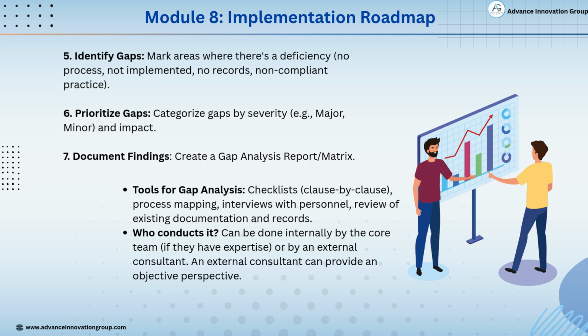This means creating a gap analysis report, or matrix, where everything is recorded clearly. For this gap analysis, we use various tools such as clause-by-clause checklists, process mapping, interviews with staff, and reviewing existing documents and records. As for who should conduct the gap analysis, it can be done internally by the core team if they have the right expertise. Otherwise, hiring an external consultant is helpful, as they bring an objective perspective.